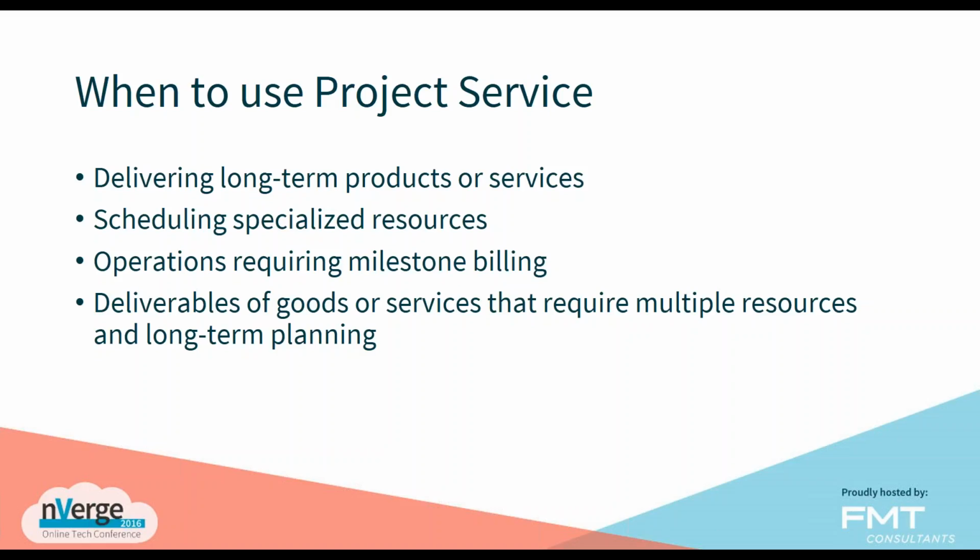It also gives us the ability to schedule the specialized resources that are needed at each stage within that project delivery. So for example, when looking at doing any development work, we need to have custom programmers that are certified and capable to be able to deliver quality code, making it an efficient system. And those resources can cost a little more than somebody who's doing Visio diagrams, for example. And so what we can do is have the specialized resources required for each stage applied to the appropriate time during that project lifecycle.